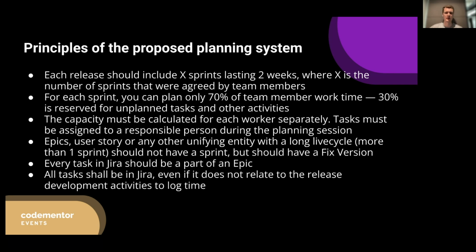Sprint, I believe everyone knows what that is. And fixed version is a release version in Jira. It's just a thing that separates your project releases, let's say. For a hardware project, it's common to have fixed versions. It could be directly linked with the board version, or with anything else. For example, general version of product, alpha or 0.9, 0.99, 1.0. When you do a release or major changes, you switch the main version.